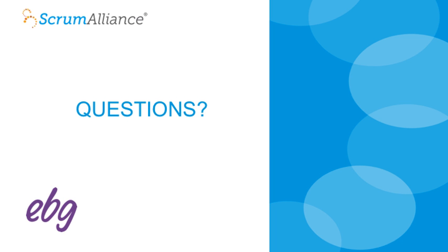We have a question from Laura. Is the discovery board based on a single epic, or on multiple epics? Good question. You can use it for either. Most of the teams are going to be exploring one at a time. So if you're talking about an epic, a chunky story, we'll do one at a time and then either paper over the section of the wall where we discussed it, or just add the other epics as we go.